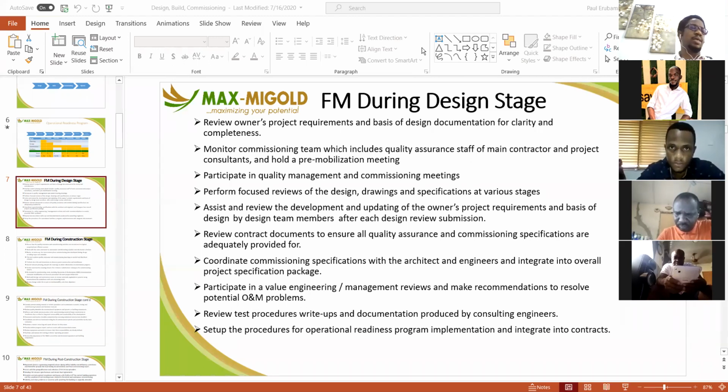So while I'm taking the design drawings on one side, construction drawings on one side, I want to ensure that the as-built drawings are also captured. The same thing with as-built bills of quantities, the same thing with everything from pro forma to actual. That's what I'm talking about. That change must be documented. And then of course, during the course of construction, all kinds of value engineering considerations will come up. There'll be variations. Variation control in your construction project should include a line item.